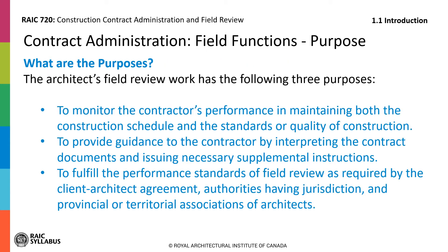What are the purposes of field review? The architect's field review work has the following three purposes: to monitor the contractor's performance in maintaining both the construction schedule and the standards or quality of construction; to provide guidance to the contractor by interpreting the contract documents and issuing necessary supplemental instructions; and to fulfill performance standards of general review as required by the client or architect agreement, authorities having jurisdiction, and provincial or territorial associations of architects.